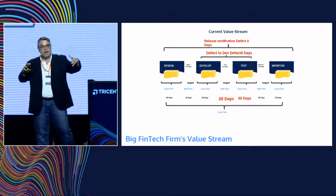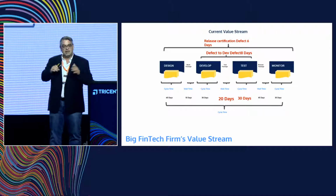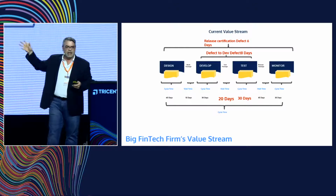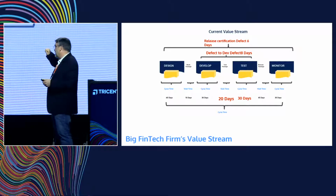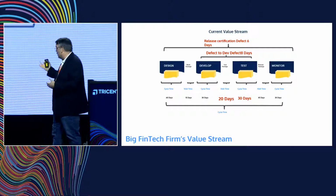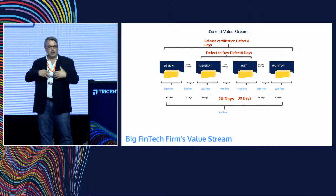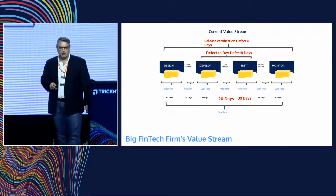So this is a value stream map. I put some lean principles in here, and I also put systems thinking in here. Not just measuring takt time or cycle time, delivery time, and so on. I'm actually looking at how long those feedback loops take. And things started to look pretty interesting as I dug in. For example, 30 days for something to be in test. Thank you for 30 days. That tells me they're delivering too big of a package to test. 20 days waiting on test. Well, why is that?